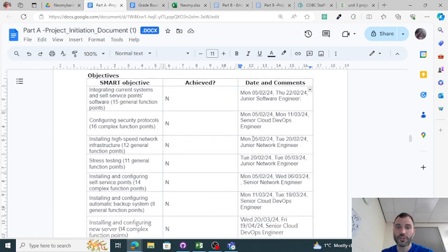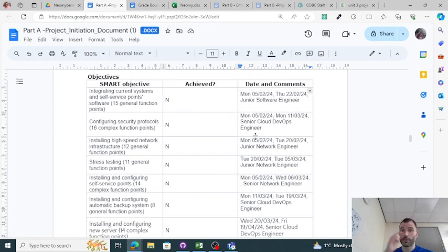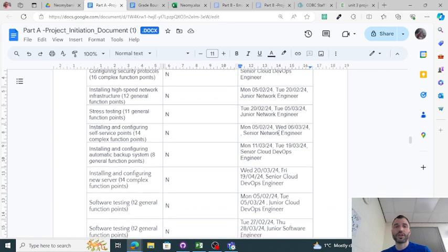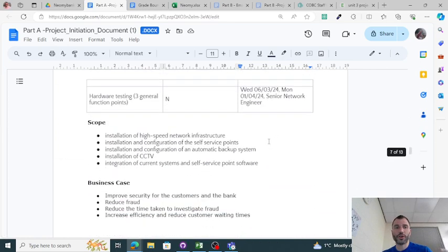This table is really useful, as I realised when you come onto the checkpoint, because on the checkpoint I pushed some things forward by 5 days because of the delay in delivery, or the fibre optic cable issue. And that actually had a knock-on effect for some of the other tasks because they had engineers doing other things. So it pushed some of the other things forward. So when you do that, you can then say it was meant to finish on this date, but because of that knock-on effect, it finished on that date. So there's more detail there about how tasks got moved around.